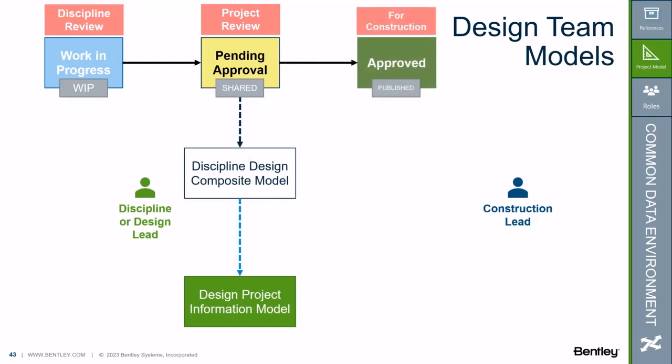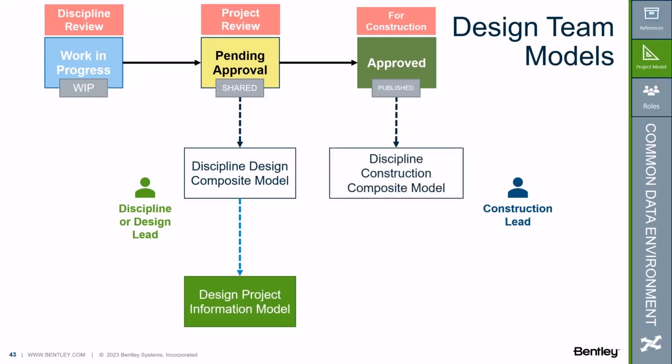Now, to prove it, we had it situated where once the whole design team determines that the container is approved for construction, then the lead project manager or BIM manager would approve the container. And it would now be designated as approved for contract and would be denoted as the published CDE status. That's common data environment.